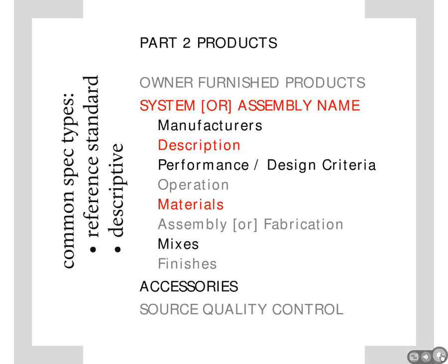Because, again, we discussed at the beginning of this category, this is a question of responsibility, and the design team has to take responsibility for the performance of a masonry wall. We can't unload that responsibility onto a designer unless we take a purely performance method, such as in a lease build-to-suit design build kind of project.